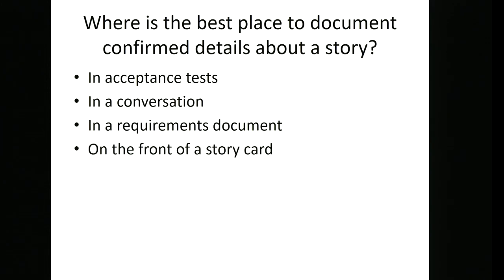So if your software is able to meet these requirements as we've specified them here, then we're going to be happy with it. In fact, there are tools you can use if you're not a programmer. Customers can work on a spreadsheet where they input certain values and what the expected outputs are, and so on. This is an established technique that we can use in Agile software engineering for maintaining this. So we want them in acceptance tests. That's the correct answer there.